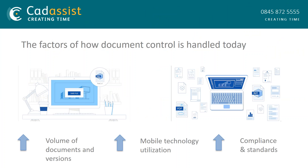There are three factors in play that are changing how document control is handled in today's construction projects. The first is overwhelming pressure to produce volumes of documents, manage versions and release accurate information to the field. This has added complexity with the adoption of BIM and the requirement for sharing model-based design. Second, mobile technologies increase demand for instant access to the latest information, with versioning happening in real time. The third is compliance and legal requirements for a single data repository for entire projects. The document control manager is no longer a one-person job — document control is now democratized and requires a collaborative effort.